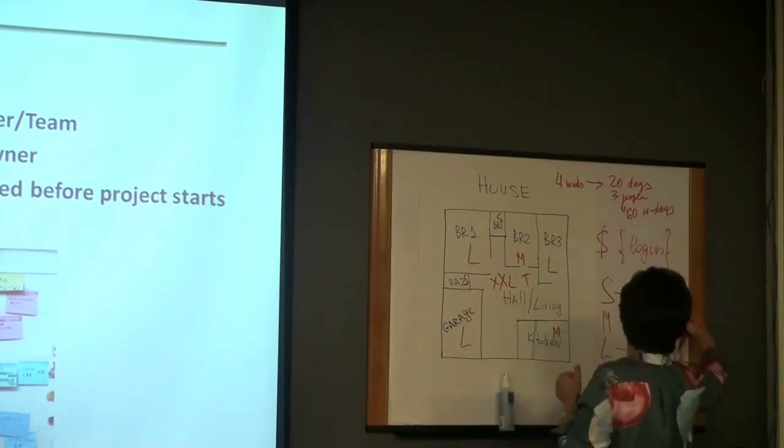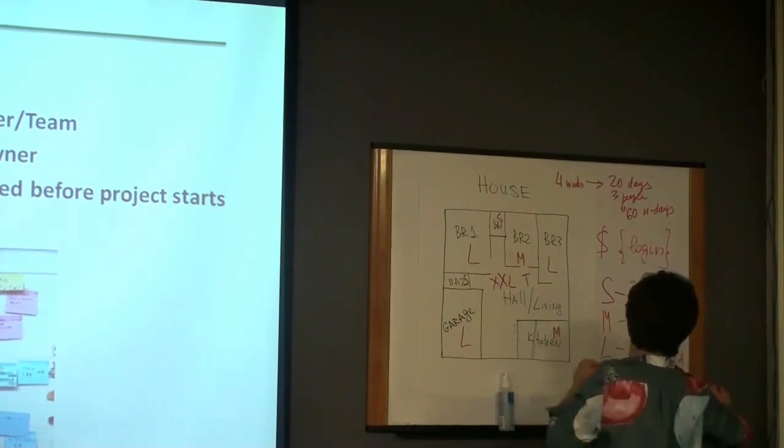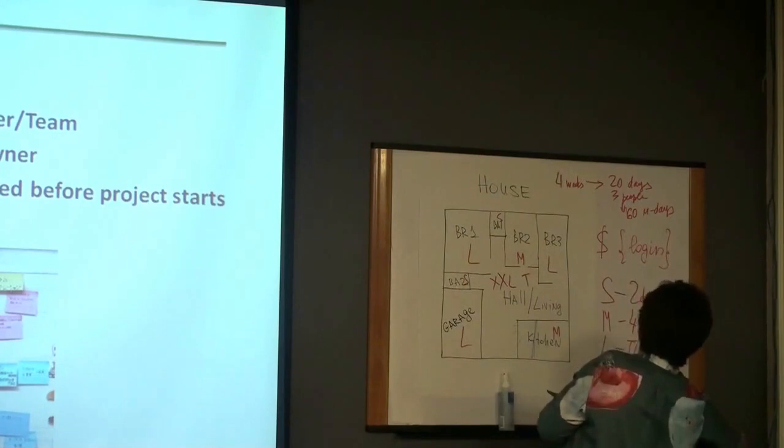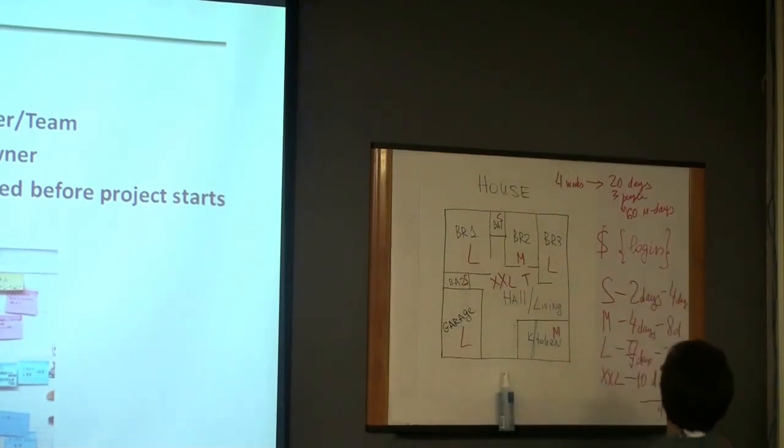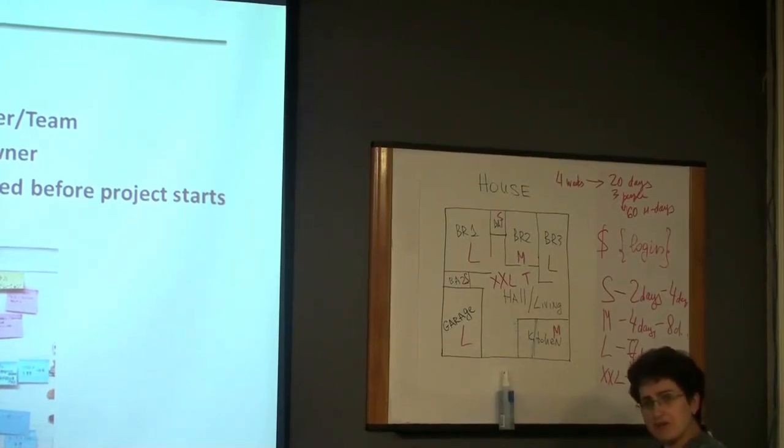And how many days of development and testing effort do we have in total? 4 and 8, 31, 43? Yes or no? Yes. Okay, yeah, so 43. We are lucky, because it seems like we can finish all of our features in 1 iteration, right? If the iteration is 4 weeks.